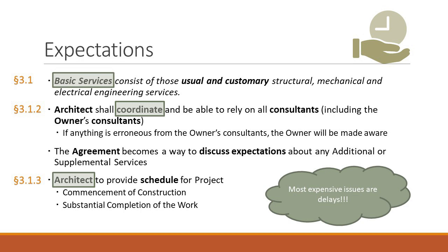And then it says, once approved by the owner, the time limits established by the schedule shall not, except for reasonable cause, be exceeded by the architect or owner. So everybody has to comply with those dates. This paragraph is as simple as time is money.